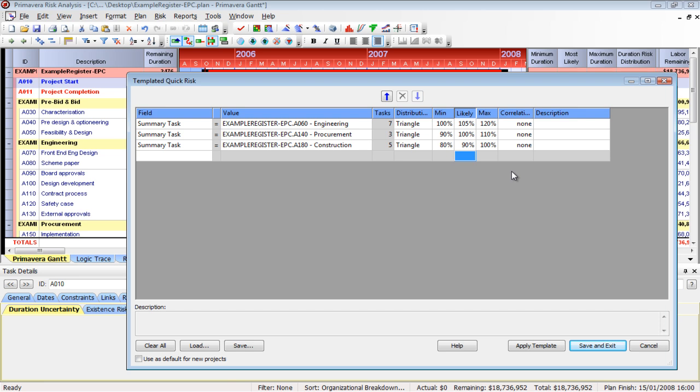Let's review them. If you go line by line through 2,000 activities, there's no way you can review and find the bugs in that. Whereas when you're doing this, even though it's a higher level, I can go through and say, wait a minute, those construction activities, we didn't really put those at worst case. We think those are the likely cases. Why did you put so much optimism on them? And we can get that dialogue going in that discussion.